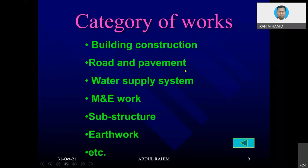Category of work: in project development there could be building, road, water supply system, mechanical, electrical, substructure, and earthwork. In some big high-rise building projects, substructure work is given to a different contractor, and after they complete it, it is handed over to the superstructure contractor.